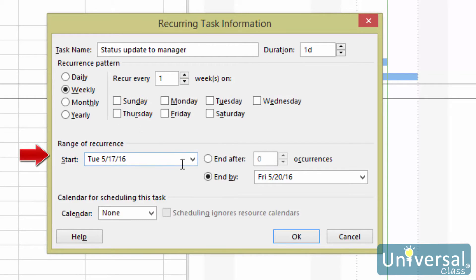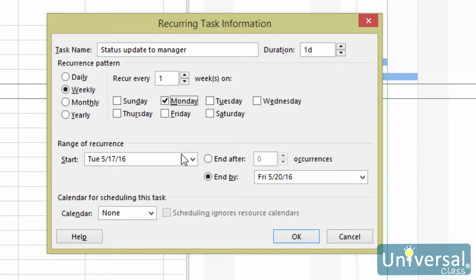Next, select the range of the recurrence. This tells Project how long the task recurs — does it recur for a month, a year, or another period of time? For example, perhaps your task recurs every week for six months. Your range of recurrence would be six months.